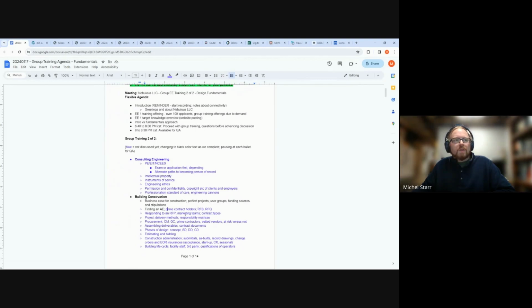It really depends on what's being accomplished and which way. So a request for proposal would be put out, looking for that architect or engineer, presumably, versus just knowing one. That's possible. But it could be a request for a bid, or a request for qualification. If it was just a request for proposal, then they would be saying, we think we need to build this, we want to build this, and we need somebody to help us figure out how to build this, would be potentially an example.